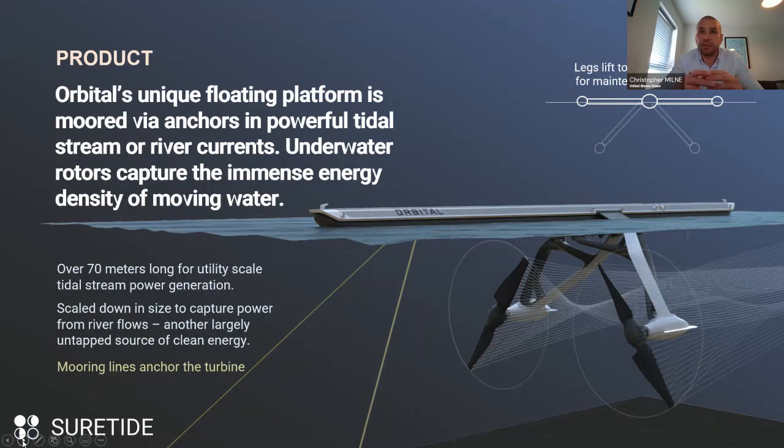The device itself is constructed on shore in a nice, dry, controlled environment, and then it's towed out to site and installed on its moorings. These low-cost workboats can cost us something like £3,500 a day. Compare that to the heavy lift vessels that may be required to put some heavy equipment down on the ocean bed, and you can see some of the cost advantages that this approach has.